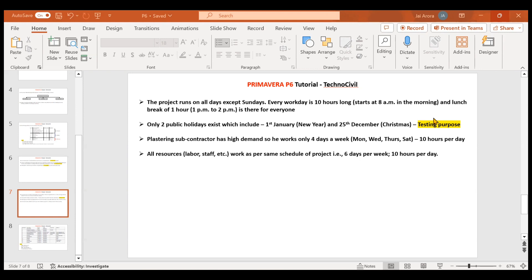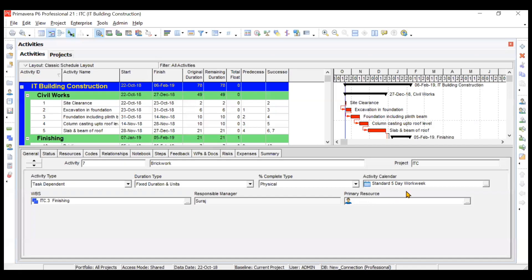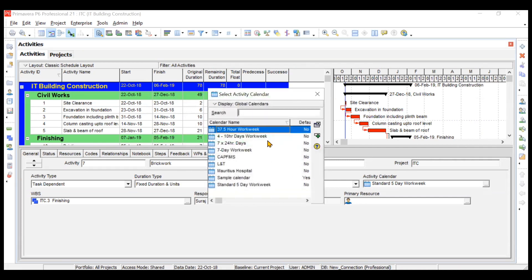Assigning the calendars we'll learn in the next video — it will be a very short topic. But creating calendars is very important. Primavera P6 gives you some predefined set of calendars. If you go to the activity calendar option, you will have some set of calendars like four 10-hour days, work week, seven by 24 hours days. But these calendars may not suit your project.